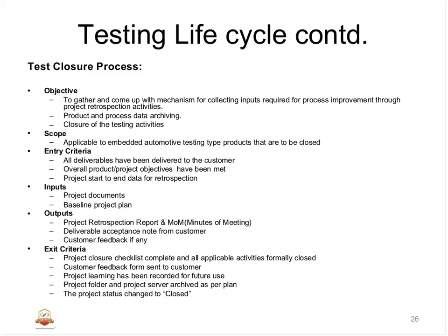As part of the closure activity, we record all the aspects of what we have done in the process and how we can improve on the lessons that we have learned while implementing the testing. And we are going to archive the product that we have delivered, because it could be required anytime to revisit or to redeliver, whatever it is. We need to have an archiving mechanism as per the plan. Closure of the testing activities means we are going to put a full stop to all these testing aspects.